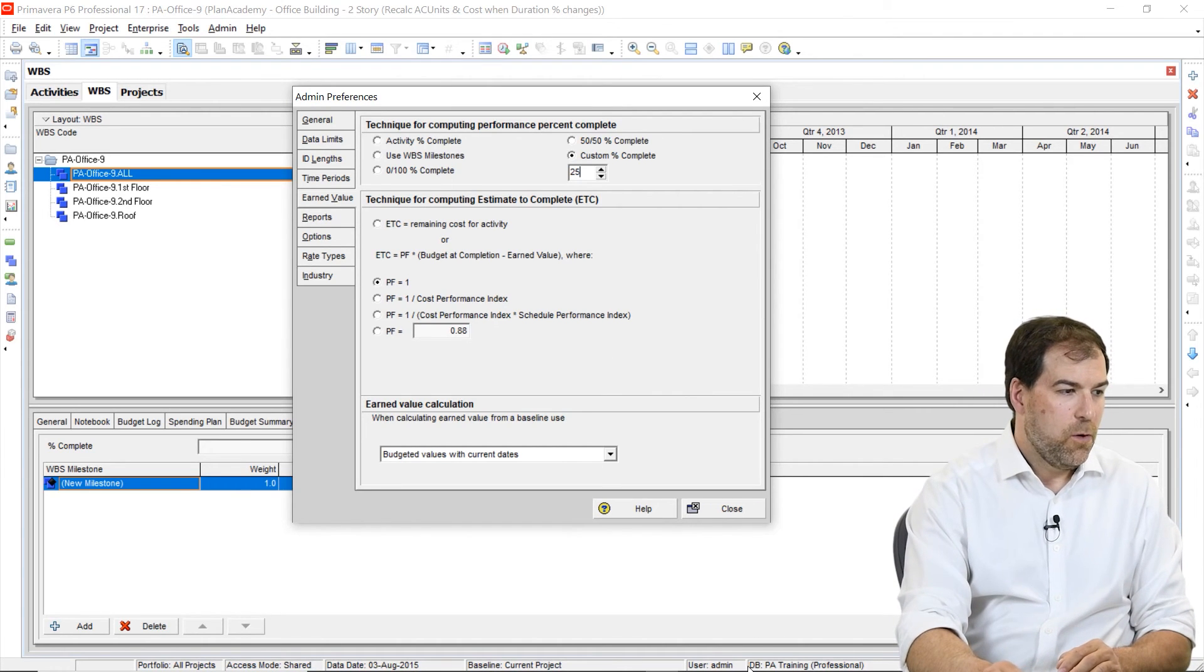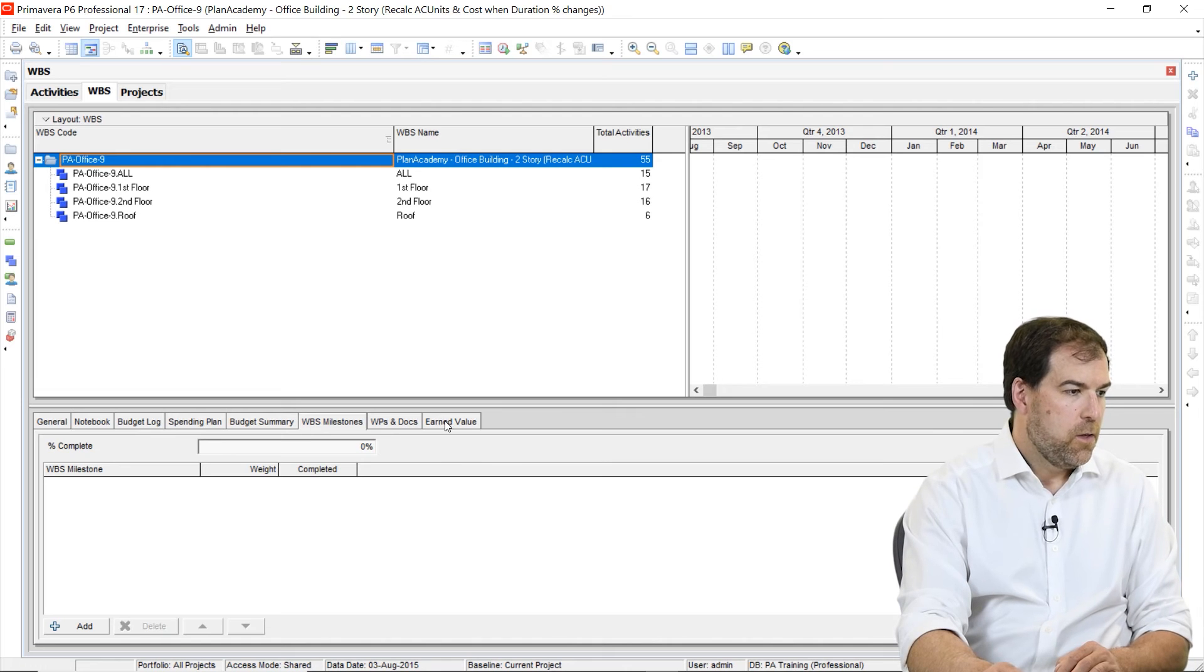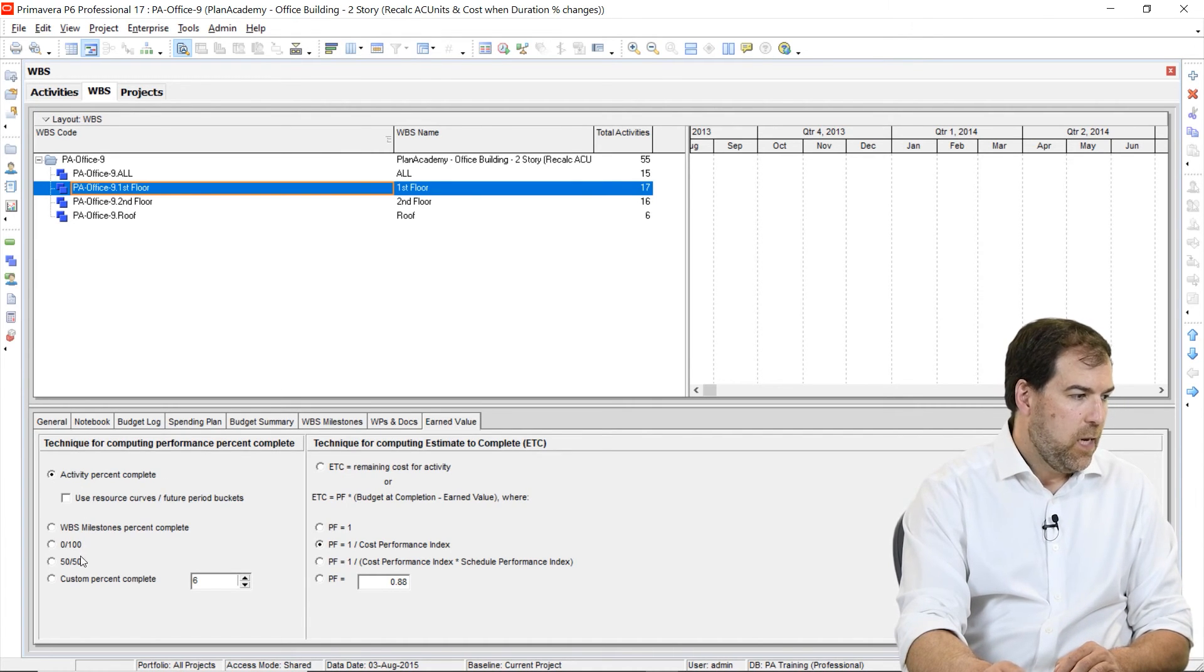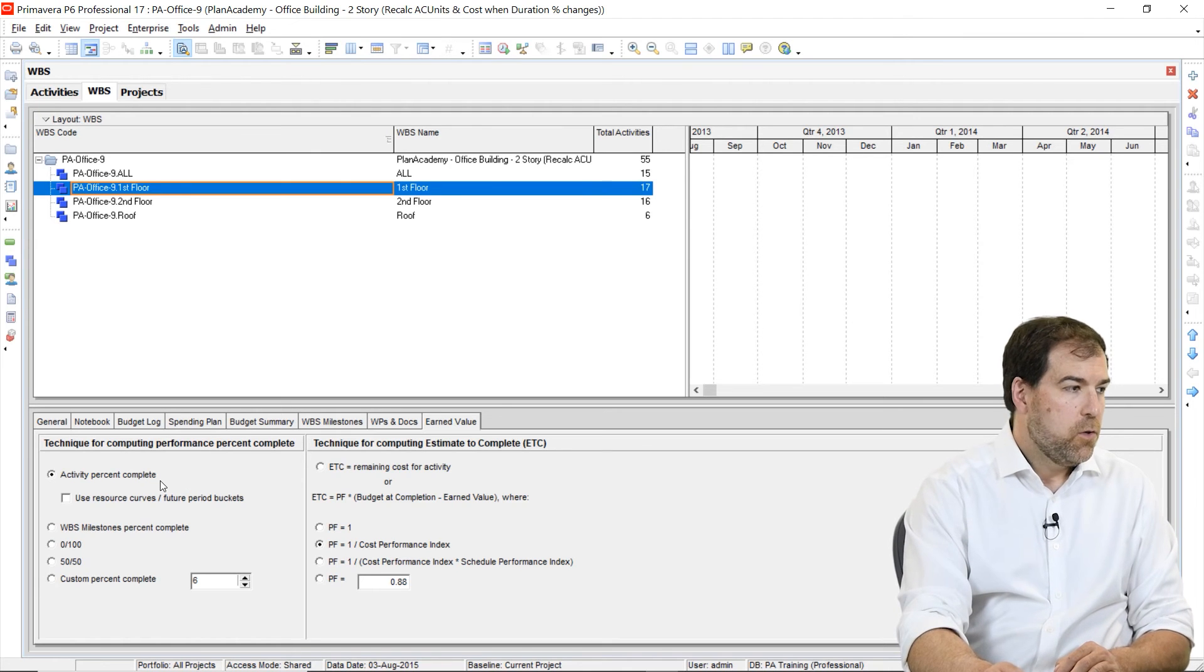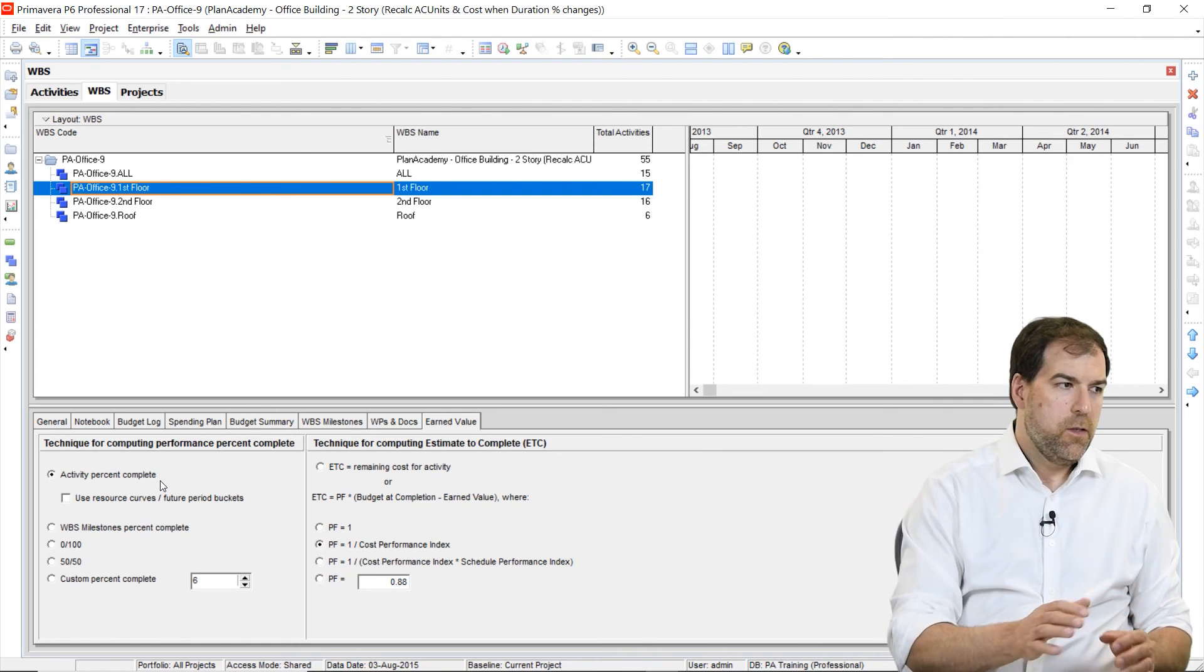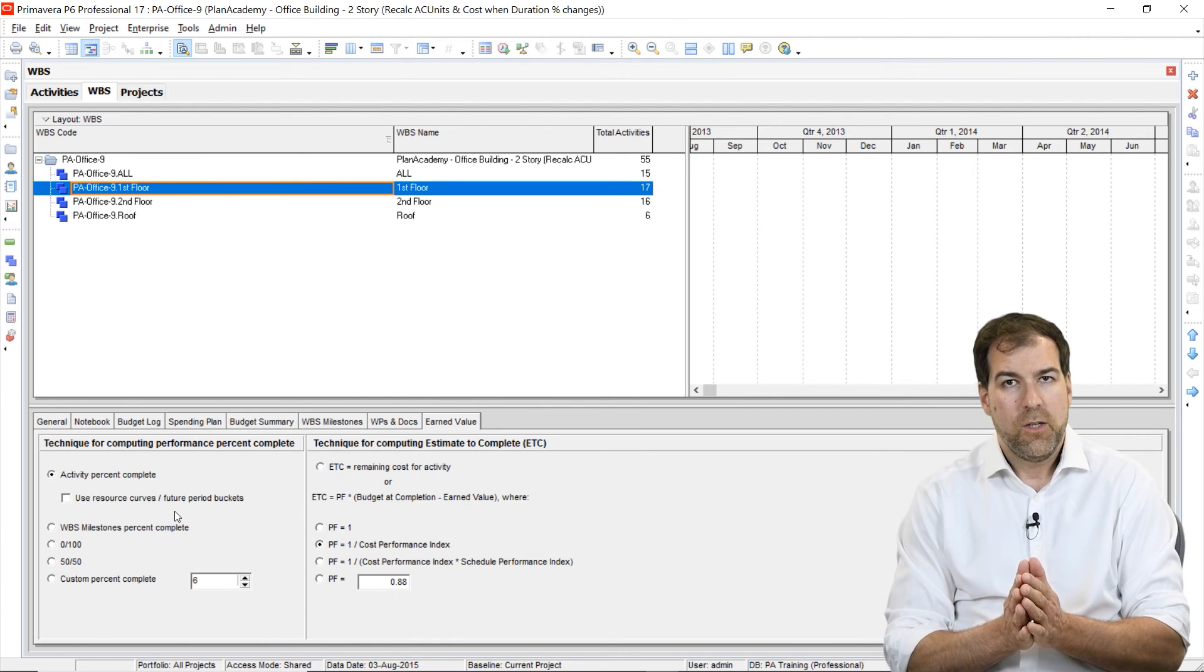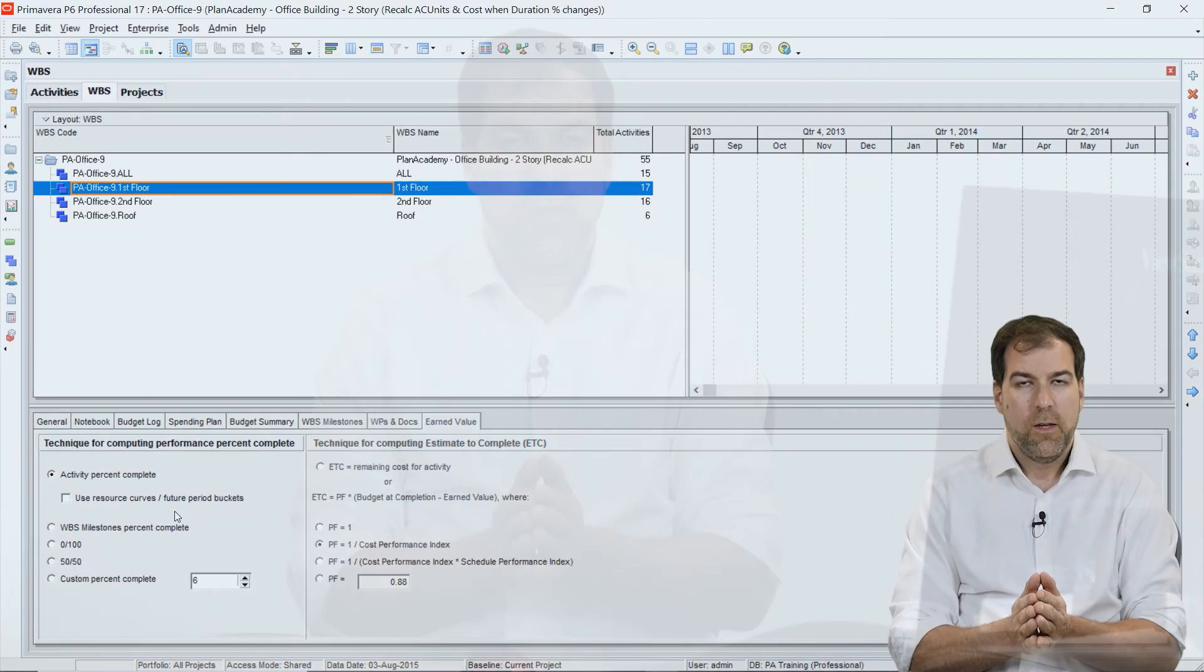So I did want to just show you one more time here that these admin options for computing performance percent complete, we can also find these options in the work breakdown structure area, and by highlighting any WBS and selecting earned value tab, we have the same options here. So we have activity percent complete, and then our milestones 0% in the custom ones. So you can choose to set this value for different WBSs. Different WBSs could have different values. Again, I'm going to stick to my recommendation of just keeping things simple. Use the option that's called activity percent complete, and notice how that translates from your activities to drive your performance percent complete, which drives all of the earned value calculations.